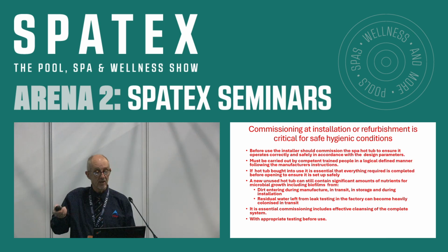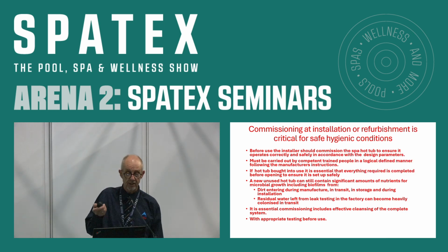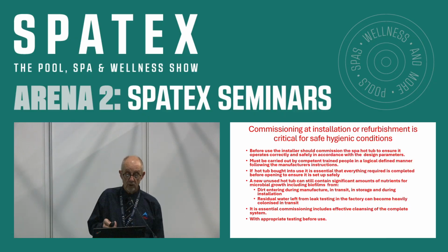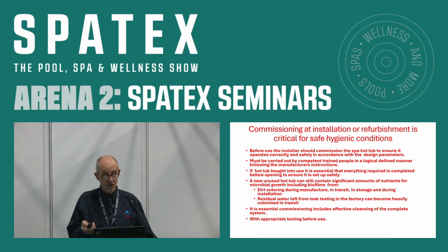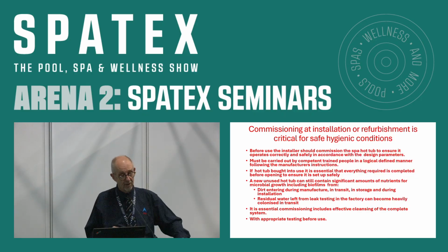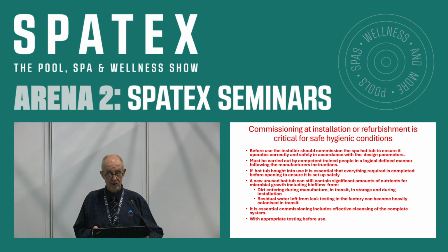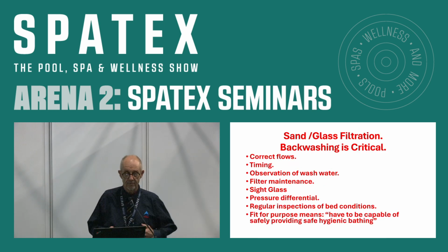A new unused tub can still contain significant amounts of nutrients and microbial growth. Dirt entering during manufacturing, transit and storage, and during installation. Residual water left from leak testing in the factory can be heavily colonized. It is essential commissioning includes effective cleansing of the complete system, that's chemical and physical. Okay? So it's not enough just dropping a few chemicals in. You should be physically cleaning it with brushes or whatever, and then appropriate bacteriological testing, chemical testing before use.